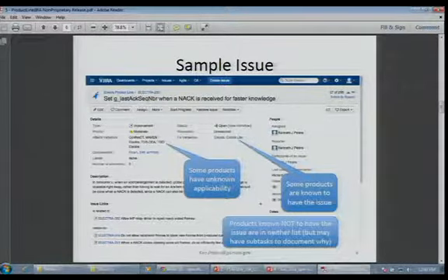Now, there might be some products that you know don't have the issue already, or it's been determined that they don't. So those don't show up in either of those labels. But depending on how you decide to use the system in detail, they might have subtasks to document why they don't have the problem. You might have put it in the unknown applicability affects version list initially. Someone looked at it and said, oh, that doesn't apply. And so basically you removed it from this list, perhaps with a subtask saying, here's the tests we did that show that's not a problem for our particular project.